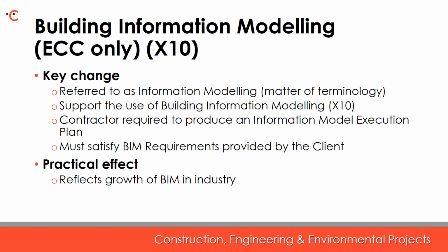NEC4 also introduces a secondary option X10 to support the use of BIM and the management of BIM requirements, including ownership of information and liabilities of the parties. NEC had previously produced some standalone clauses for incorporation in NEC3. It is referred to as information modelling, but this is just a matter of terminology, perhaps to reflect that NEC covers more than just buildings.